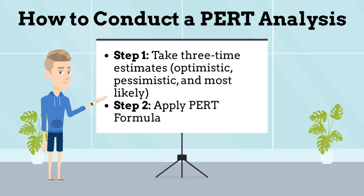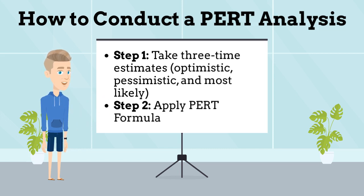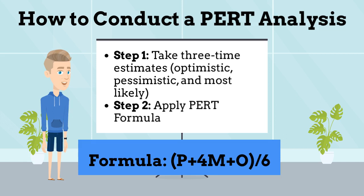The second step is where you take each of those estimates and plug them into the PERT formula. The formula is: P plus 4M plus O, divided by 6. The result from the formula will be your minimum time to complete a project.